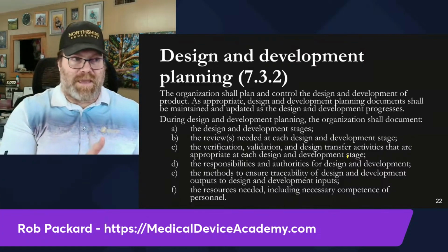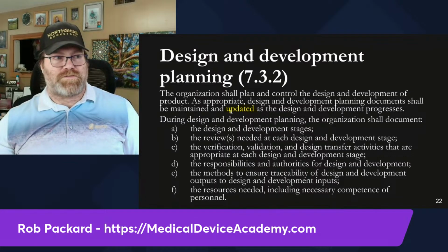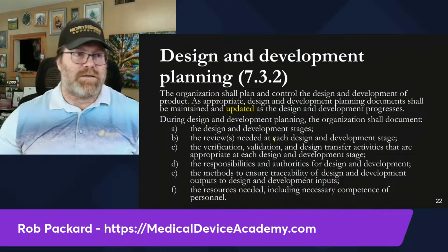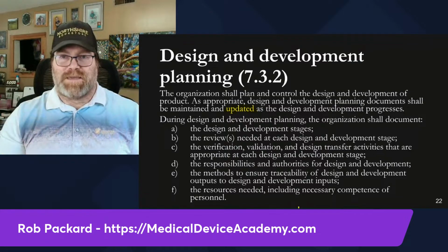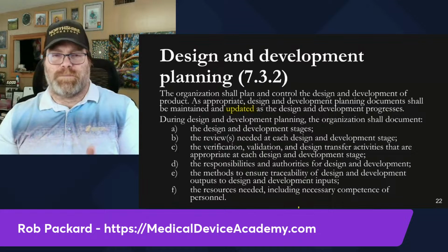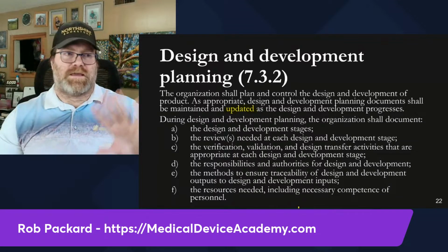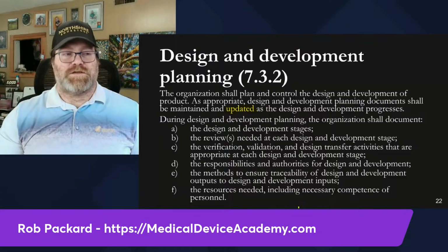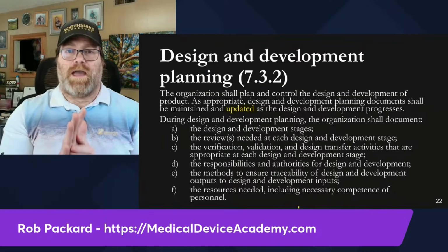So update. It should be updated. It says it right here. I'm not making this up. It's in black and white on my screen now, yellow, black and white. So update as the project progresses. You have to maintain it and update it. So come up with an initial draft of your plan and update it as you make changes, please. And I even have a video where I demonstrated I can create one in 30 minutes. So it's not that hard, and it will really help you.